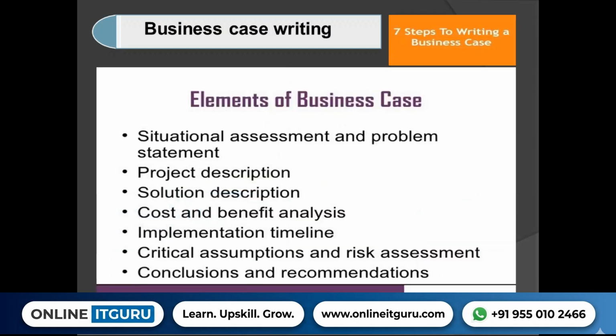Here are some of the steps for how to write a business case. Business case is nothing but analyzing a project. These are the steps: situational assessment and problem statement, project description, solution description, cost benefit analysis, implementation timelines, critical assumptions and risk assessment, conclusion and recommendation.